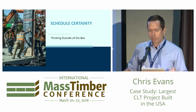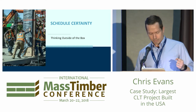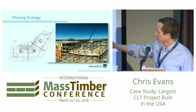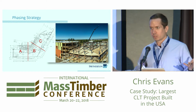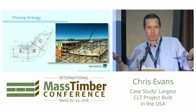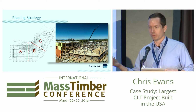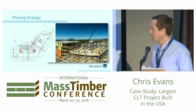So we were trying to figure out, how do we get to schedule certainty? How do we think outside the box? And here's the footprint of the building. It's a 30,000 square foot footprint and 5 stories tall, type 3A building. Conventionally, you would come in and just say, we'll build the whole thing up 1 floor at a time, and 15 weeks later we'll put a roof on, we'll be dried in, then we'll start our interior work.